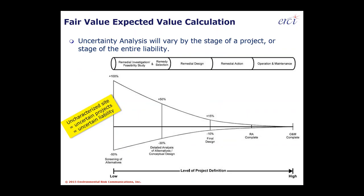If a project is at an early stage or has never been characterized before, the degrees of uncertainty are quite wide around that estimate. As more information comes in about tasks needed to execute a project and as there is better alignment between what a project is and what the liability is — which are not necessarily one and the same — that uncertainty gap gradually diminishes.